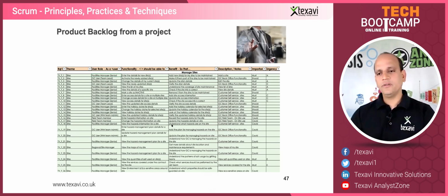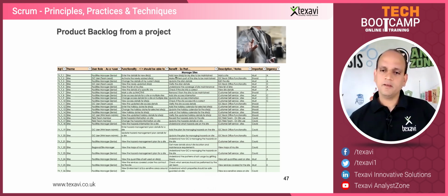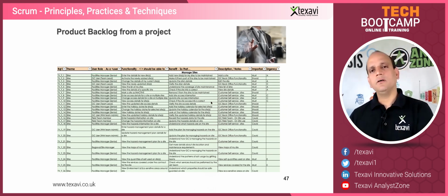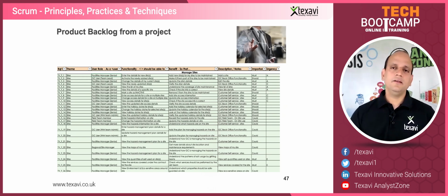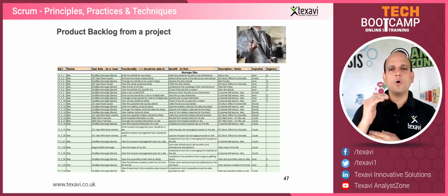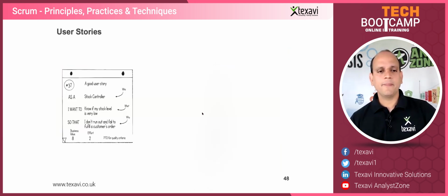And then once you go into the sprint planning meeting, or even just before it, we can take only those 6 or 7 stories which are must and A. We then have a look at those, and look at how many of those 7 stories would actually be feasible technically, given the time limit and all those resources. And then we'll either give a commitment on those 7 stories, or we can say, oh, we can't do all 7, we'll do 3 or 4. So that's how it really works.